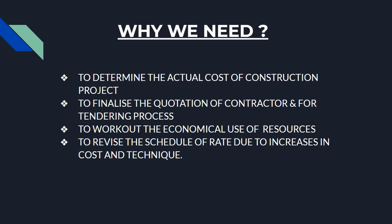Suppose you have given a particular work quotation, and two or three years later, in the market the cost increases and even labor increases — that will not be profitable. So for that, we need to revise the rate at a certain time and within a certain limit.